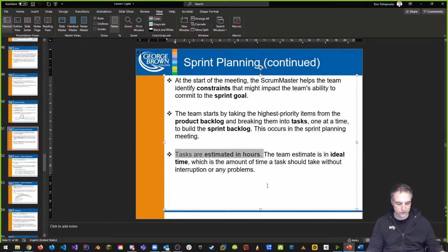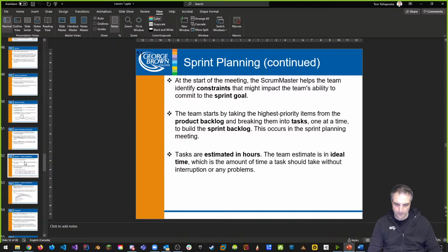Sometimes story points are useful because the simplest thing you can do is 1 story point. Something that's twice as difficult is 2 story points. Something of moderate difficulty is 3 story points, and so on. And sometimes people use things like the Fibonacci scale. So instead of using 1, 2, and 3, they use 1, 1, 2, 3, 5, 8, 13, and so on. Okay, that's how the Fibonacci scale works, or some other scale.